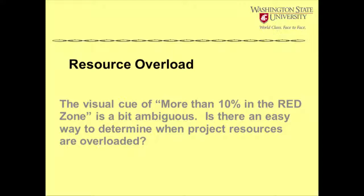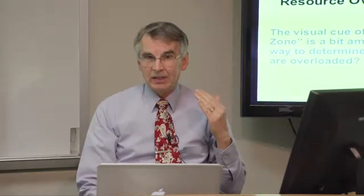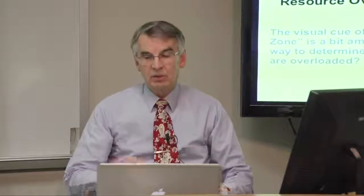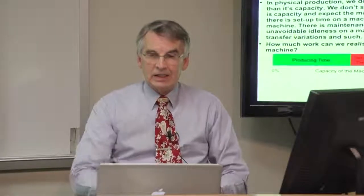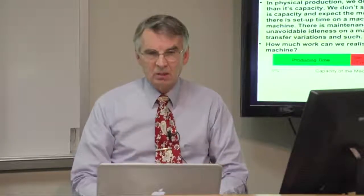If you'd like to get less than 10% in the red, if you can't get 10%, if you have more than 10% of the red, you need to choke back and stop releasing new work until you get it down to things in the green. That's how you be predictable. But it's a little harder to deal with that, so let me explain just a little bit.